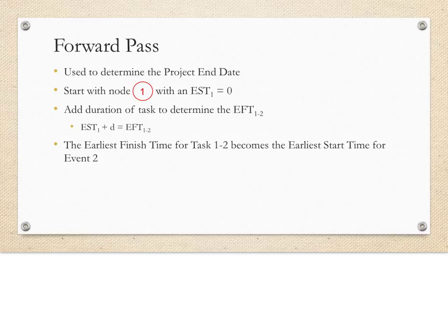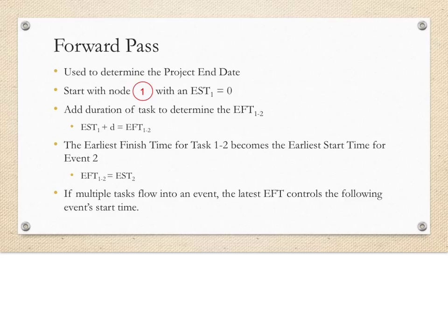This value for the earliest finish time of the task then becomes the earliest start time of the subsequent event, as shown in this equation. Now, this is important.